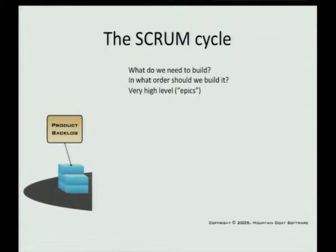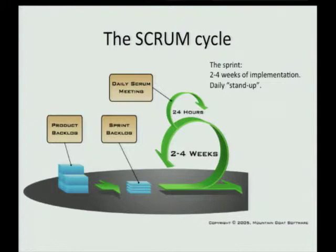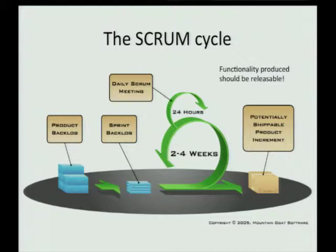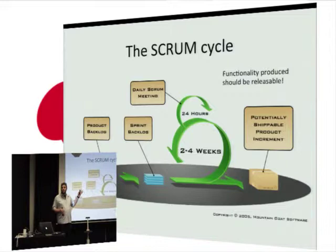That's a complete cycle. You start with the product backlog: what do we need to build and in what order? Then the sprint backlog: what are we building now? The daily Scrum meeting: what did we do yesterday, what's blocking us, what are we doing today? At the end of each increment you should have a potentially shippable product. This is one of the most important things about Scrum — if a software project runs out of money, you've always got the most important business-value items ready, releasable, and fully ready for production.